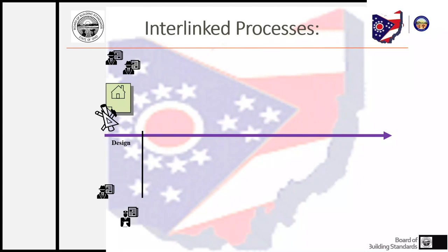If he has a business that requires some type of licensing, he needs to think about those requirements and get all that information incorporated into his documents in a way that would affect the building construction. Those designs get prepared, they get submitted to the building department for review and approval. The plans examiner, that busy guy looking over a set of plans, reviewing them, checks for code compliance, makes his recommendation to the building department.